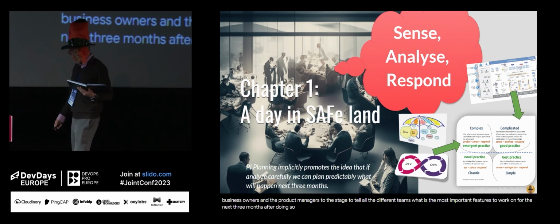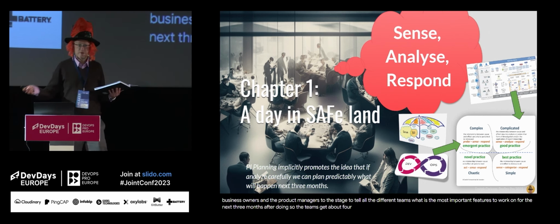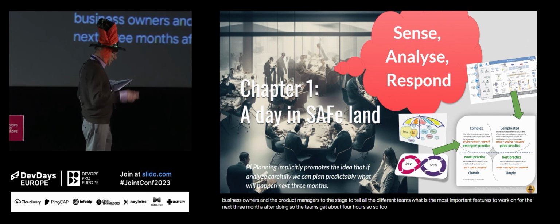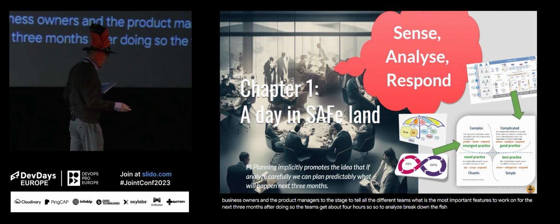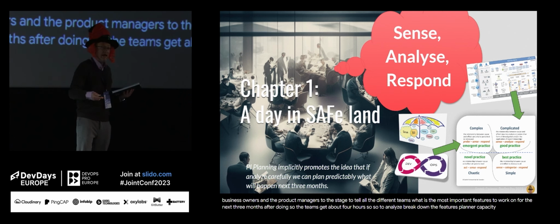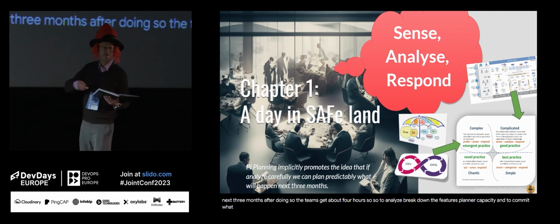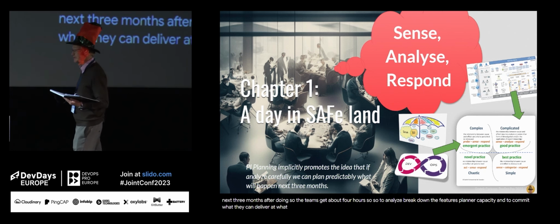After doing so, the teams get about 4 hours or so to analyze, break down the features, plan their capacity, and to commit what they can deliver at what sprint.